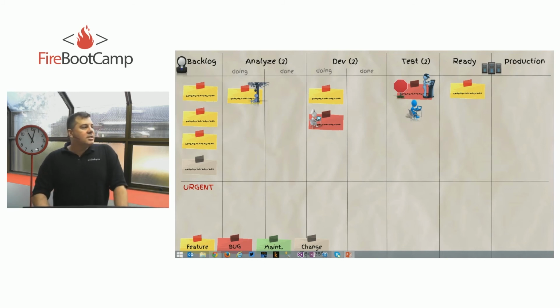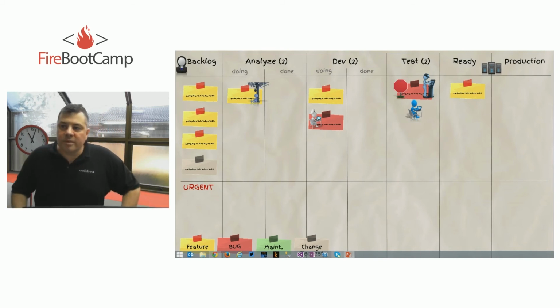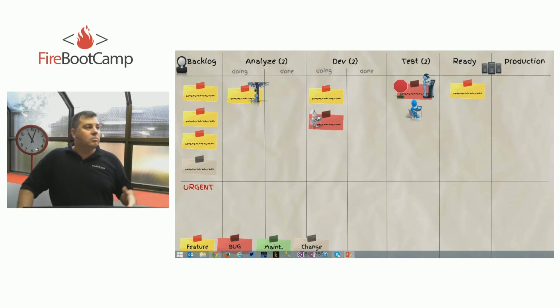All in all though, just with anything else in software development, a bug means interrupting the workflow. A bug is a bad thing to have. I think we all agree on that. As soon as you have a bug, your whole plan goes haywire. I mean, even in the Scrum world, if you have 5 PBIs that you're working on that sprint, 3 of them have bugs, right? You effectively only completed 2. Correct? Because all those 3 have to go into the next iteration. You cannot deploy that to the client or show it to the client. So a bug is an important thing.